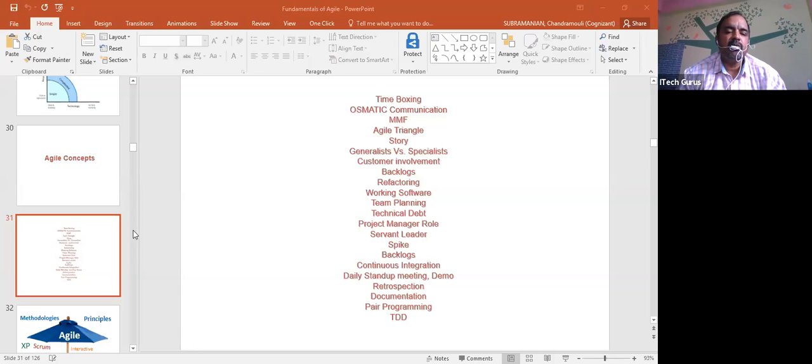You'll do some work, so the story is right. There are multiple stories you'll do. The stories need not be only in terms of business. In an Agile project, the story can also be a technical story. All of you understand and agree? Yes, sir. That is very, very important. A lot of people think requirement means only the business requirement. But here the story can also be technical. So technical stories are also written. Keep that in mind.